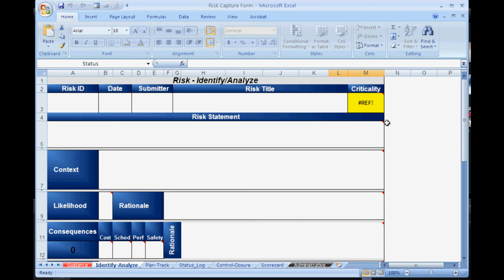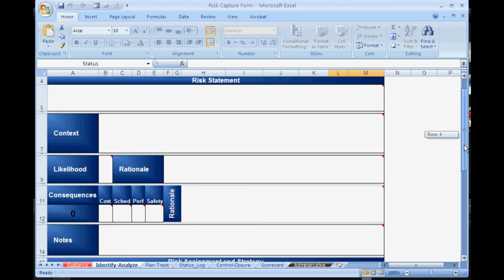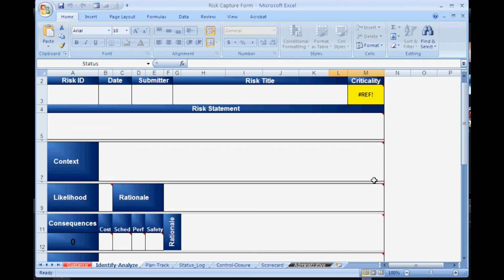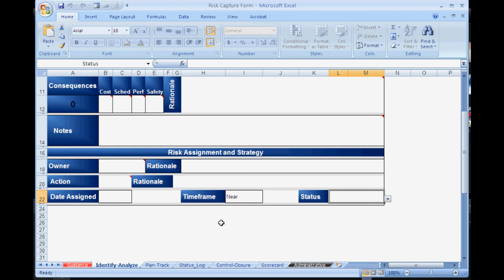The third and final step is you add your risk information. And this is straightforward, particularly if you're familiar with logging risk information. You fill in all the fields as needed. Fill in your risk score, your risk statement, eventually assign owners, explain what the status is. Is this a draft? Has the project already validated this risk, or are you reviewing it right now and you're going to validate it or reject it or decide to accept it?